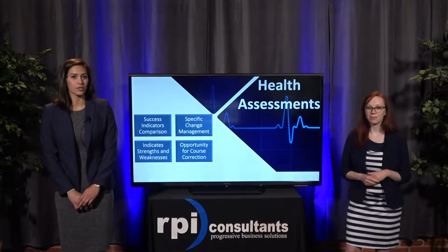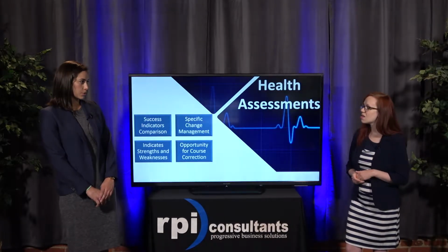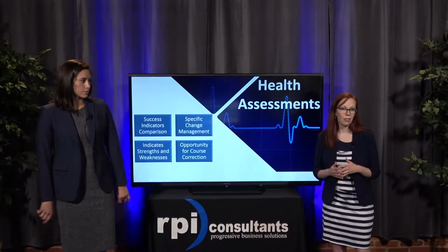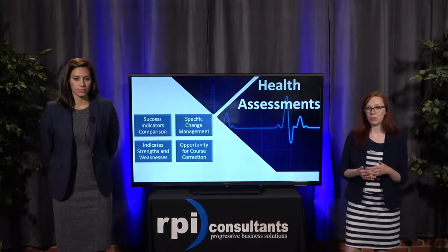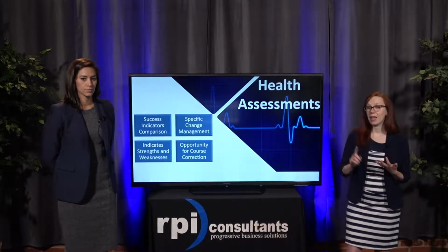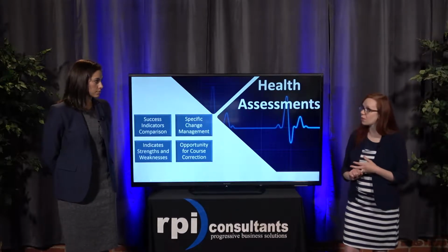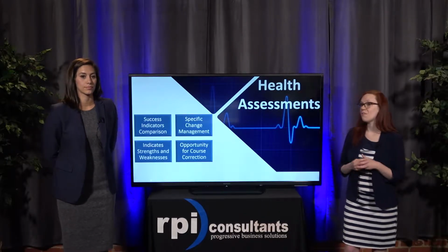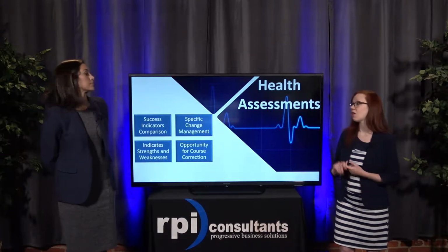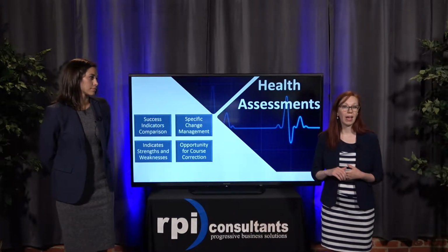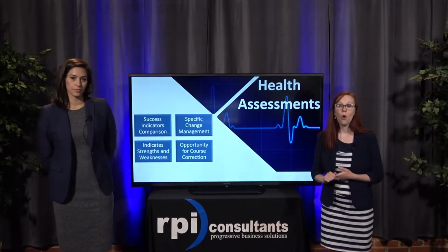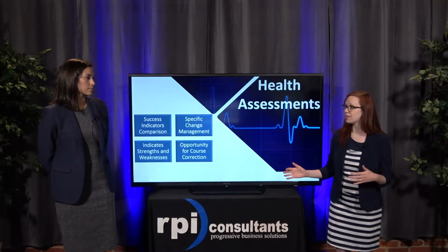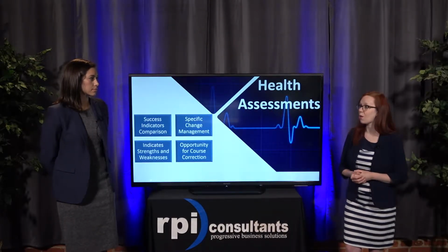Yeah, that makes sense. And then, does every project need a health assessment, or what do you typically do for health assessments? So I'm finding that you don't necessarily need a health assessment with every single small implementation. If you're doing just some training or a little bit of custom development work, a health assessment might be more effort than is really beneficial. But where they come in very, very helpful is on large-scale implementations. Anything where you're looking at a large-scale organizational change, or you have multiple team members involved, multiple parts of the organization affected. That's where the health assessment can really help the project stay on track.